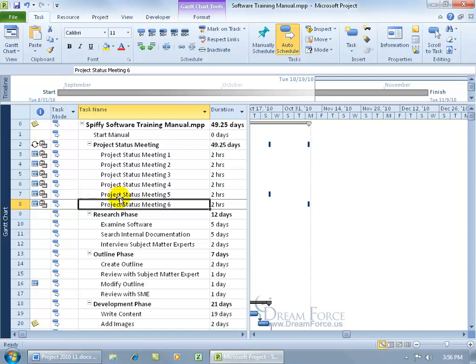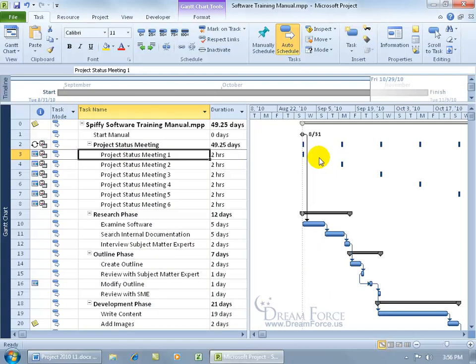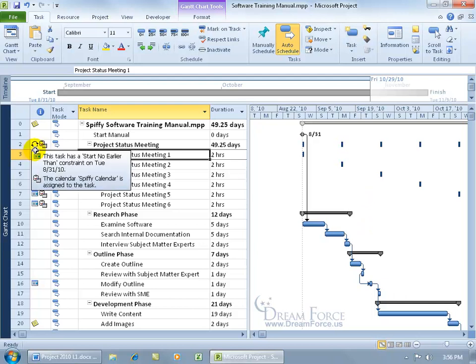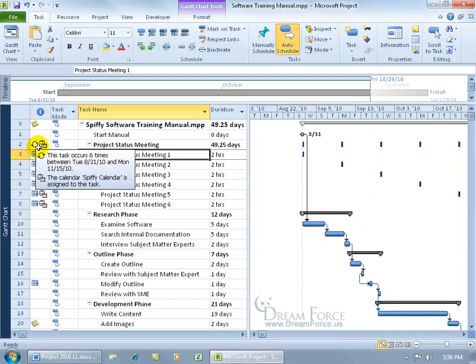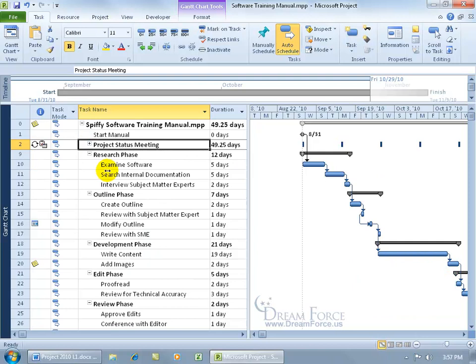So recurring, it's set, it's not linked to the other task because I haven't linked them. This is something outside of the link where I have to wait for the meeting to happen before I can go to the next task. That's not going to work for me. The meetings during the project, if they're available, great. If not, then they're busy, oh well, the meetings will continue to go on. And they won't affect, because they're not related to the other task, whether one task is completed to go to the next. The meetings will happen. You can see over here in the indicator column for the first one, the summary tells you the task occurs six times. It's got the arrows turning in on itself to know that it's circling, it's recurring, happening over and over again, up to six times. And then I can go ahead and click on the minus sign to collapse it, and then just focus on what I see over here in the Gantt chart.